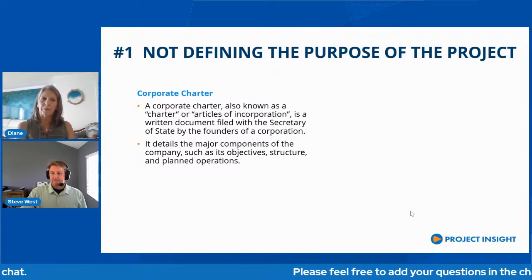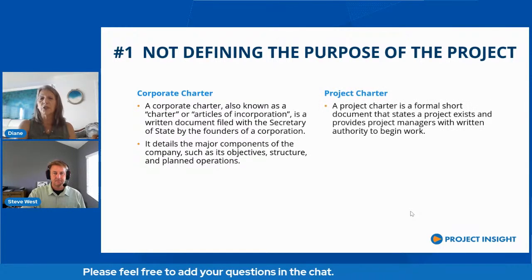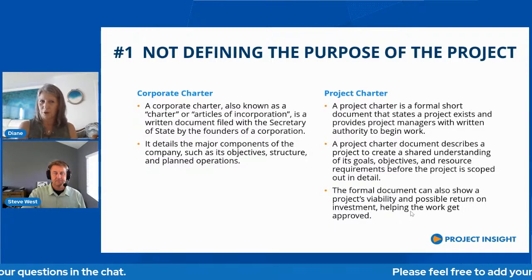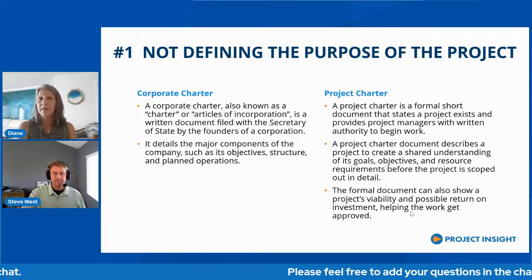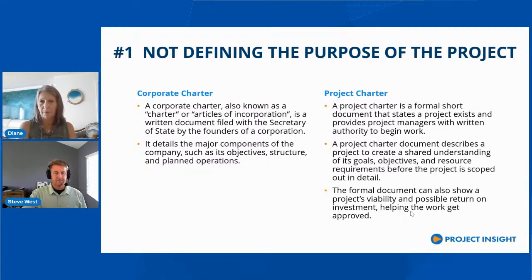So I wanted to bring up two things here: what the definition of a corporate charter is and what the definition of a project charter is. And if you read through this, because I'm not going to read these to you, they're very similar. If you are starting a business, you have to define the objectives, the structure, the operations of your business. A project charter is very similar. You're defining the goals, the objectives, the resources, what you're trying to obtain out of this, what's your ROI. It just might be a smaller subset of a corporate charter.